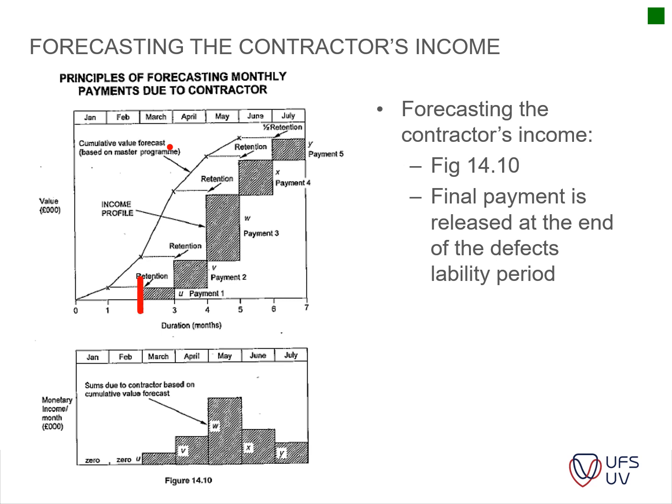So you will see that, like I've explained in the lectures, after here you're appointed, you do your site establishment and ground earthworks and so on. So you already do work in your first month. In your second month, you put in your first claim. Okay, so for the amount of work that you've done here, you put in your claim. Okay, and then you